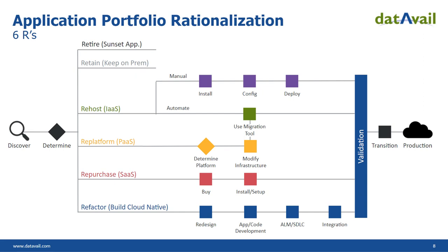But everything else, for the most part, can move to cloud. So that's where this planning comes in: if something is going to retire anyway because you have a new version of the app or you bought something, exclude that from moving to cloud. If there's a reason you want to keep on-prem, like the telephone systems, mainframe, that is out of the migration plan.